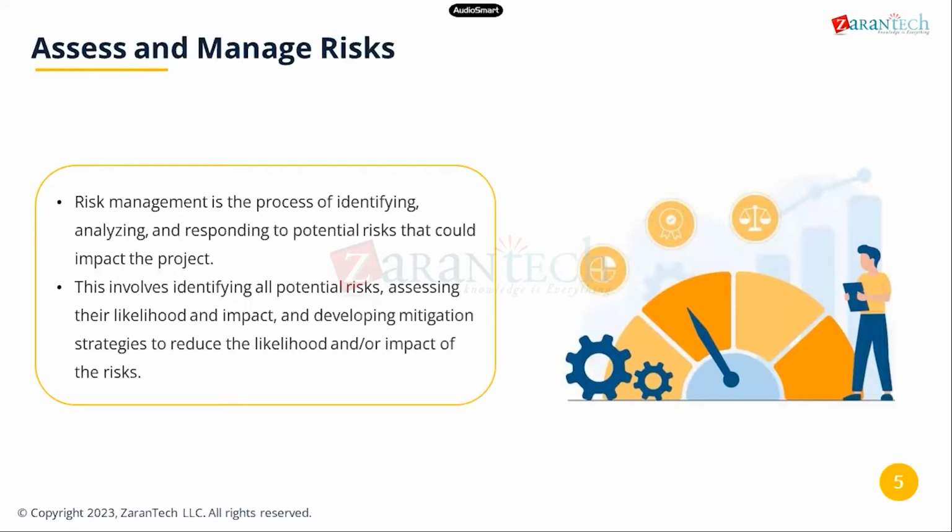And develop mitigation strategies. When we say data migration mitigation, regular data backups are taken, thorough testing, having a rollback plan in case of data loss. Technical risk mitigation, employing expert consultants, conducting pilot tests, having a phased integration approach. Resource risk mitigation, like cross-training team members, having contingency plans, recruitment strategy if necessary. All these we are handling.